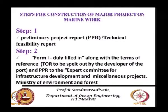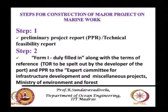Then it goes into step four. To clarify: you spell out some terms of reference and submit to the committee. It will review the terms of reference you submitted, specify additional terms of reference, and then you carry out all those things. One advantage of this procedure now formulated is that you submit the preliminary project report and terms of reference, they specify the additional terms of reference to be carried out, and with that it becomes complete.